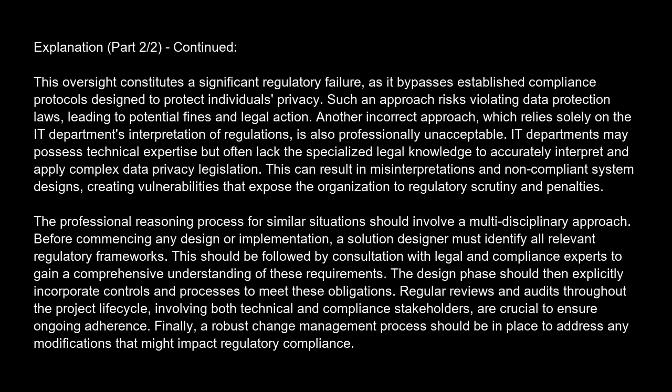Before commencing any design or implementation, a solution designer must identify all relevant regulatory frameworks. This should be followed by consultation with legal and compliance experts to gain a comprehensive understanding of these requirements. The design phase should then explicitly incorporate controls and processes to meet these obligations. Regular reviews and audits throughout the project lifecycle, involving both technical and compliance stakeholders, are crucial to ensure ongoing adherence. Finally, a robust change management process should be in place to address any modifications that might impact regulatory compliance.